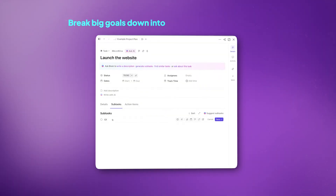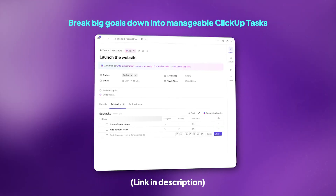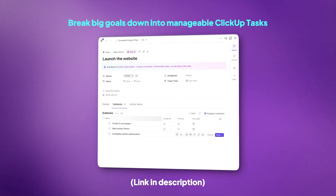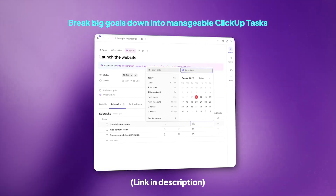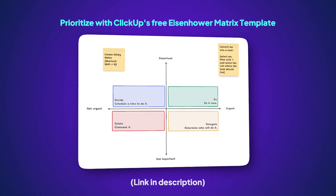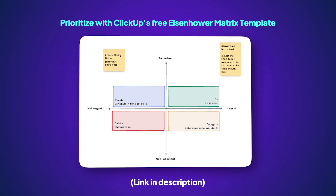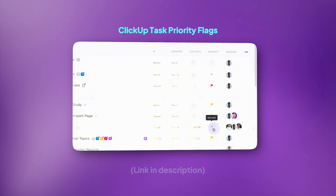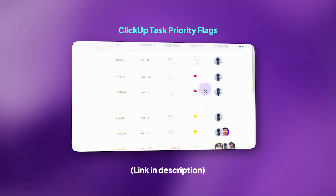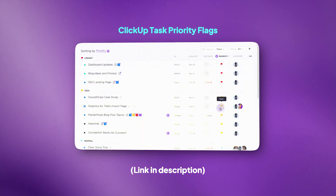You can break your big project goal into smaller, specific outcomes. Instead of 'launch the website,' try 'launch website with five core pages, contact forms, and mobile optimization by August 31st.' Plus, with the Eisenhower Matrix template in ClickUp, you can prioritize tasks based on their urgency and importance. ClickUp's four task priority flags let you classify tasks as urgent, high priority, normal, or low priority — make the most of them.